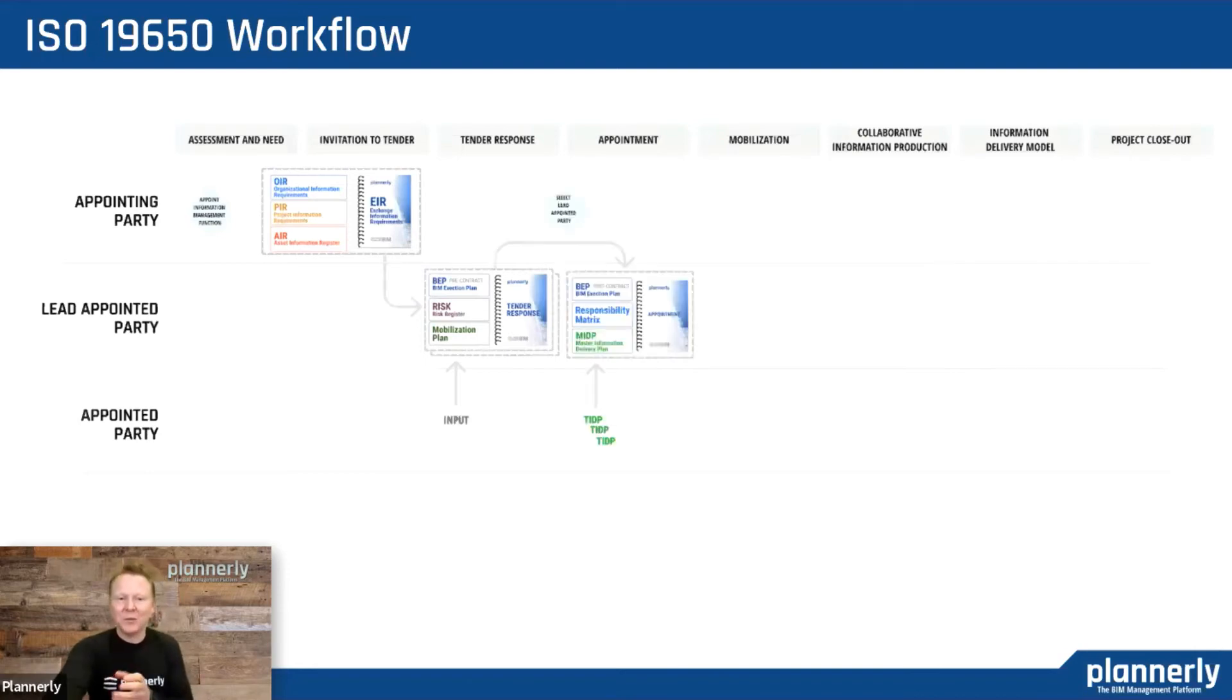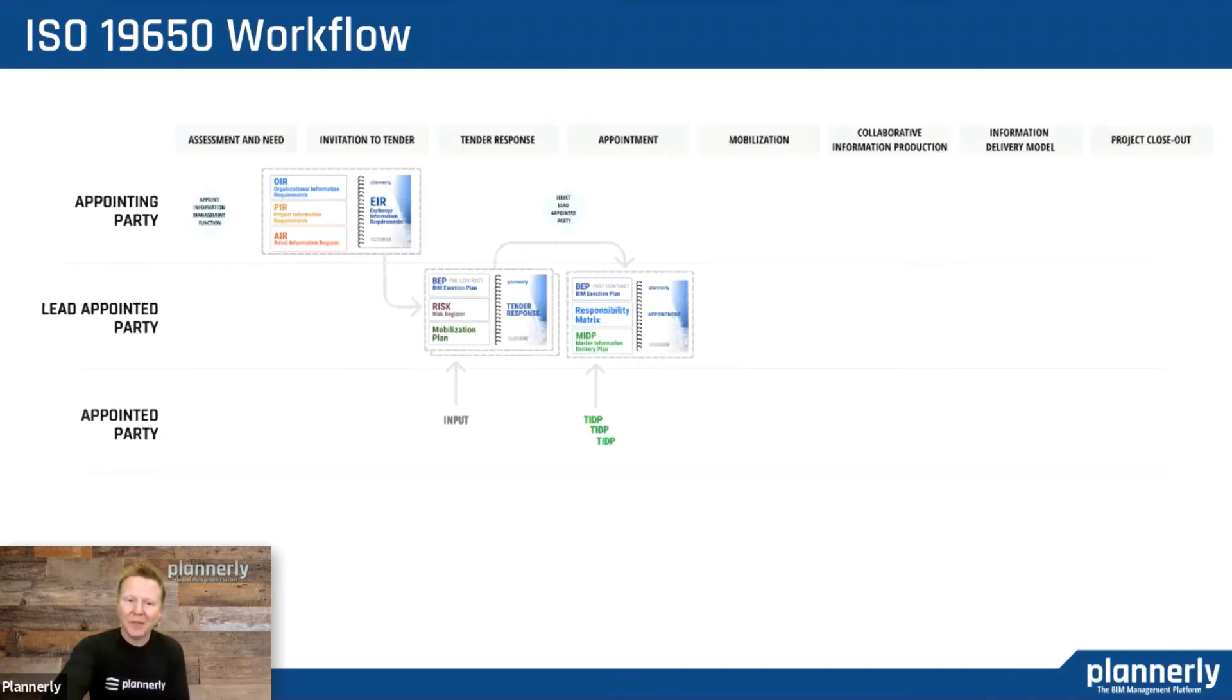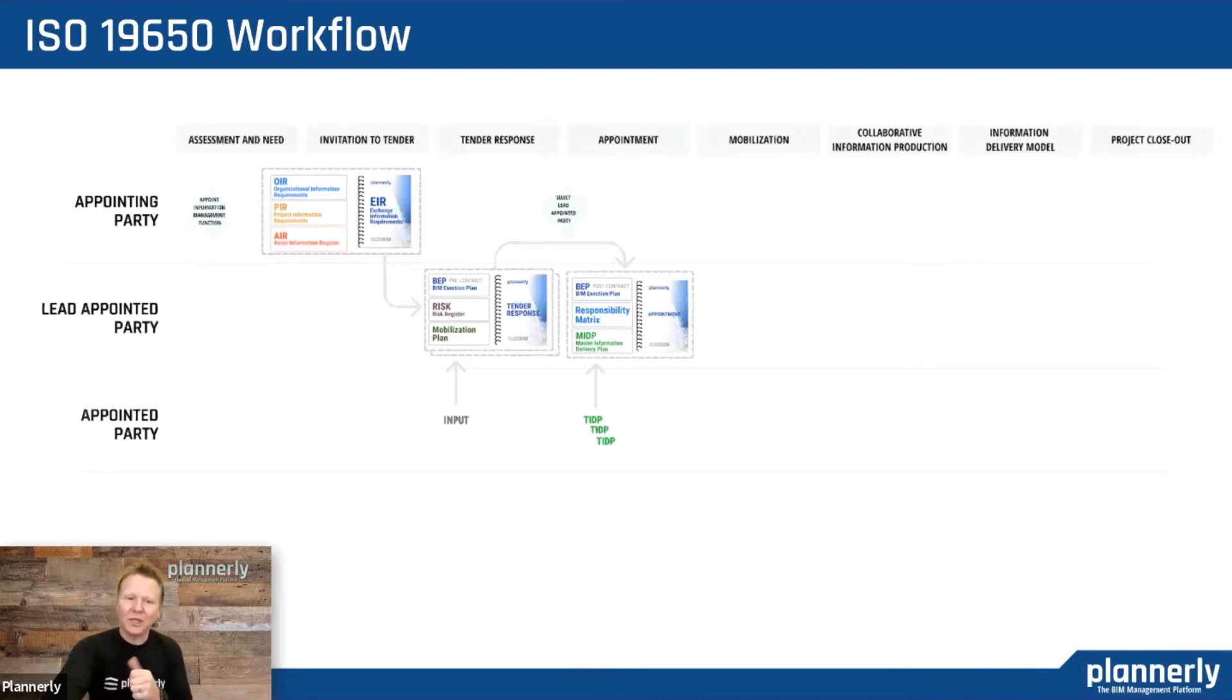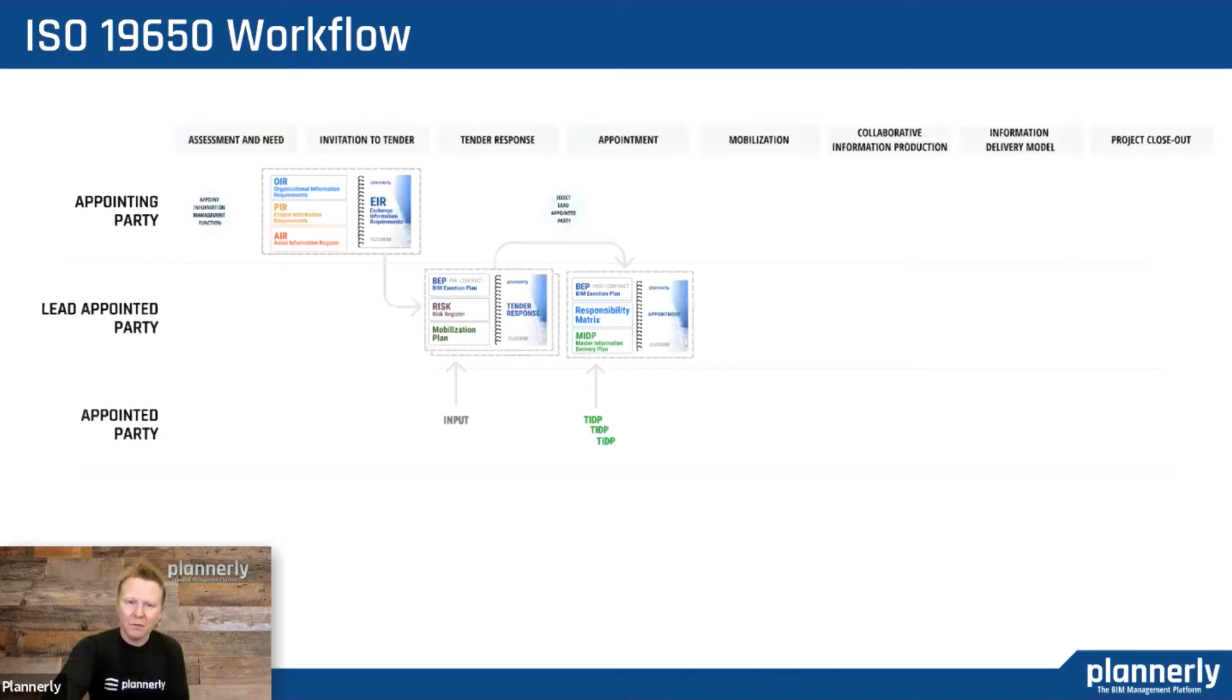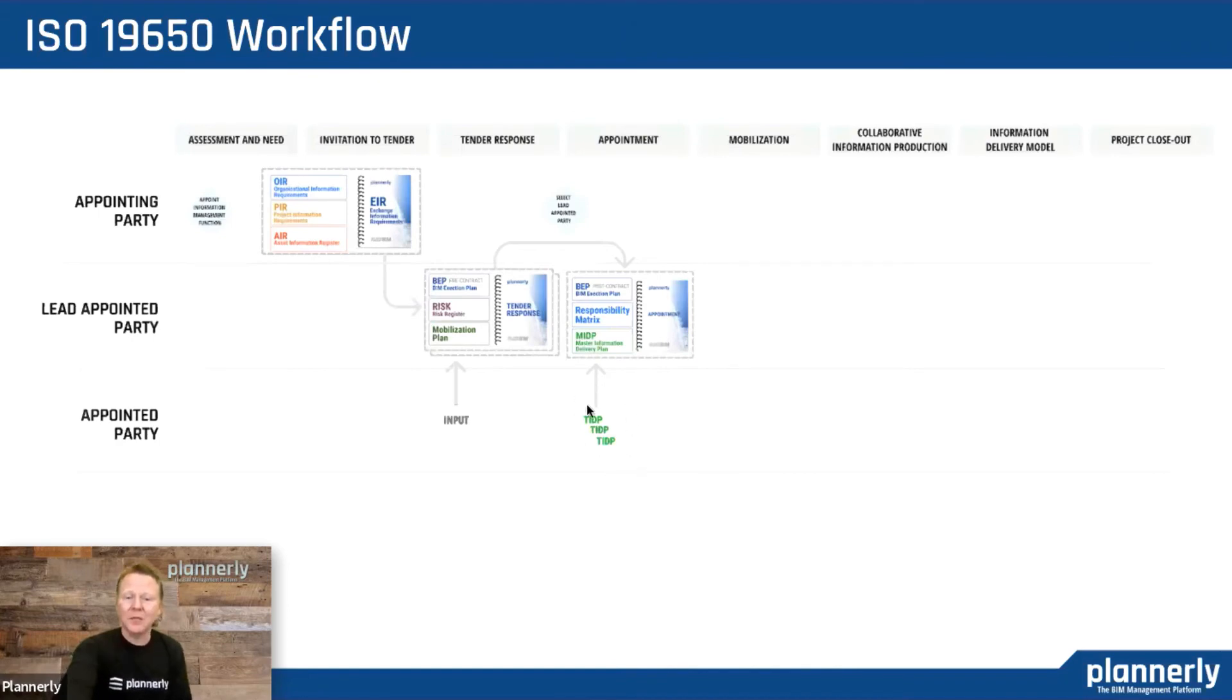You're actually contracting for this team to carry out the project. We would start to add the responsibility matrix and the master information delivery plan, which is a combination of all the teams doing the work and their task information delivery plans.